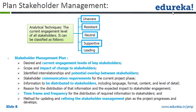There are different analytical techniques for classifying the current engagement level of all stakeholders. Some stakeholders may be completely unaware that such a project is happening. It is your responsibility to make sure that anyone who is a stakeholder — who is affected by or can affect the project — is aware of it. If they find out later, they may come up with new requirements or put a spanner in your progress. If they are powerful enough, they may even stop the project. So from the time you identify stakeholders, keep an eye open and gradually identify and inform all unaware people.